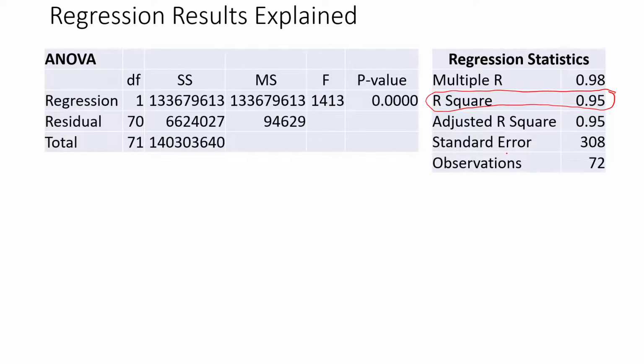You know, the cost and price can be changed because of so many other factors that can affect the bicycle cost or price. However, the variable that we are using in this case is the weight of the bicycle to predict the cost, the Y. So this is our x variable. This x variable can explain 95% variation in the cost. So this is a very strong, good prediction model or cost estimation model.